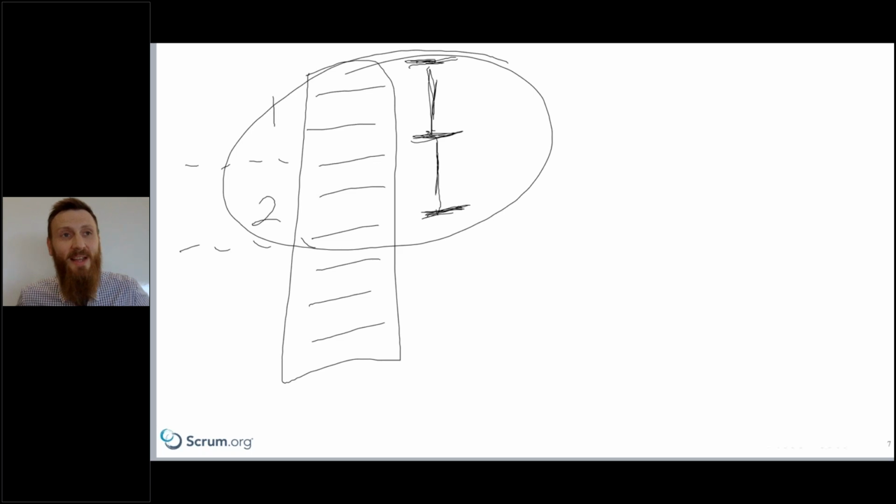So that's huge. That's something that comes up all the time when I spin up new Scrum teams and help organizations get started with Scrum. It's the idea that it is on the Scrum team, the dev team really, to be scanning down that backlog, looking for things that they need to coordinate with outside teams.